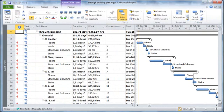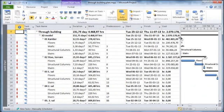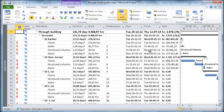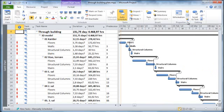I could also have put in costs, and I believe I have put in the costs here by exporting the Sigma to Excel and copying the costs into the appropriate boxes next to the activities.